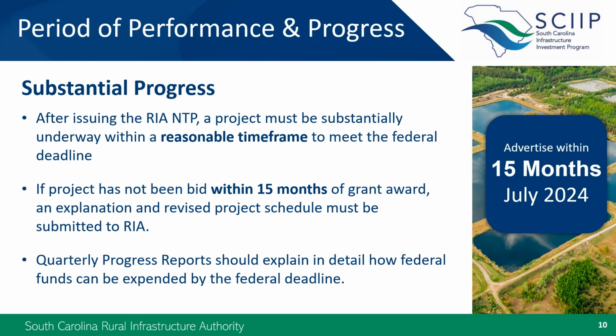As I referenced a few slides back, we understand that some projects can be underway well ahead of this 15-month mark. And we also know that other, more complicated projects may take longer. But I do caution you that if projects are beyond the 15-month mark, it is up to the grantee to demonstrate how you can still complete the project within the project grant period.